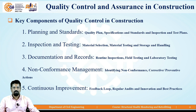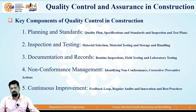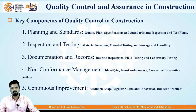These are some key points of quality control in construction. The first point is planning and standards. Whenever we start any project, we have to plan for the quality of that project — preparation of a quality plan, specifications and standards, and an Inspection and Testing Plan, which we call ITP. ITP plays a very important role during execution; we test materials which are fixed in the specification and used in execution of that project.